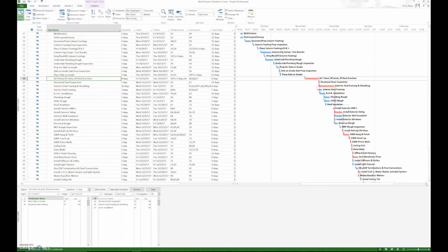Logic is so important when you do a schedule, because after you planned it and you update it as it shifts activities, if the logic is incorrect, your schedule update will be incorrect. And normally that's the complaint you'll get from on-site people, that the schedule doesn't reflect reality. And the reason it probably doesn't reflect reality is that the logic relationship, meaning the predecessor successor, is not correct. So this is your chance to prevent that from occurring. So doing a final review is very, very important.